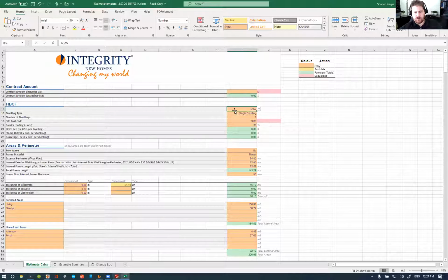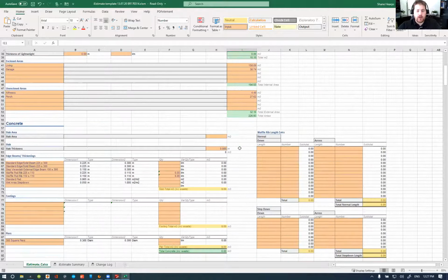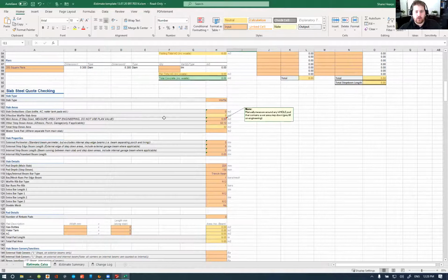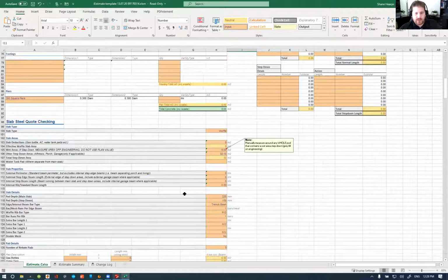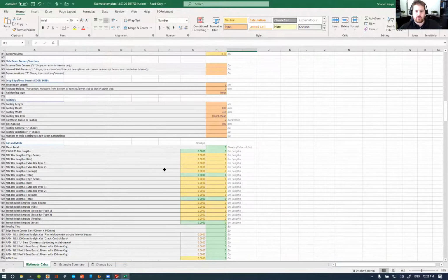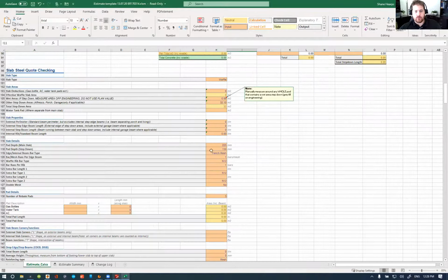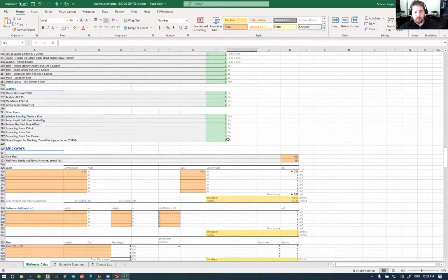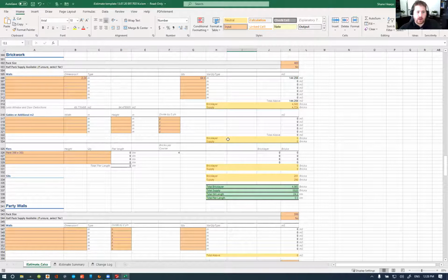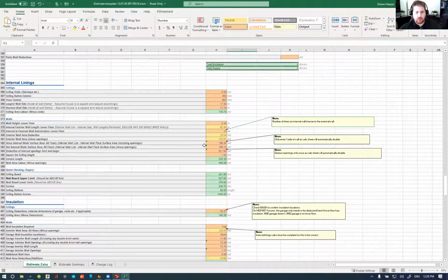So I'm just going to set this to QLD. This Excel document was pre-filled by an estimator of mine for me, so I'm just going to quickly go through and check the contents of it. We obviously can't do final slab quantities or final reinforcing. We just have to work on square meter rates because we don't have engineering. But in terms of bricks, windows, cladding, tiling, you name it, we can punch through that without too much difficulty.